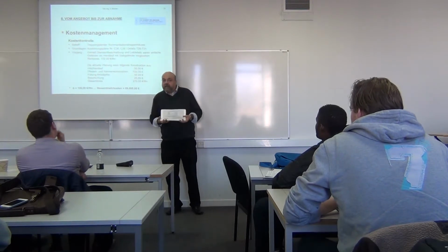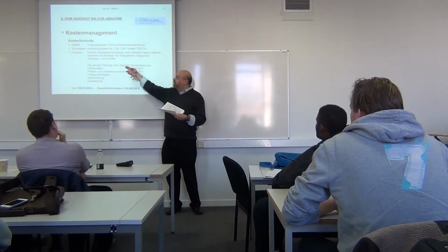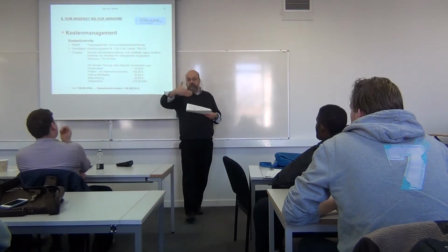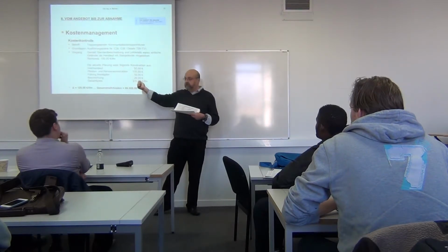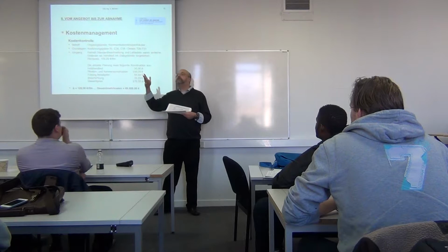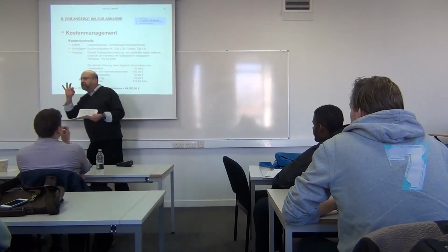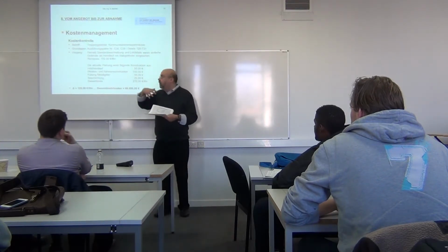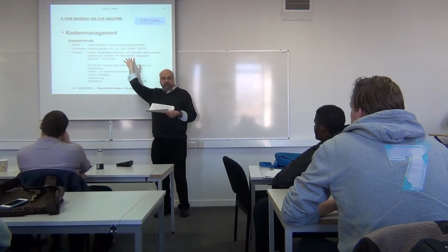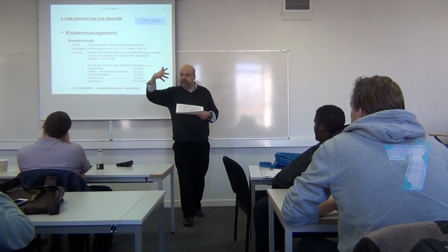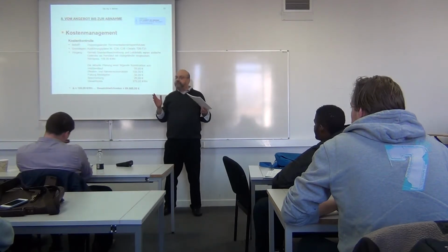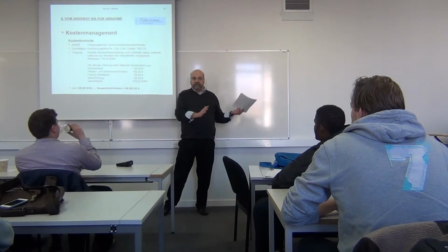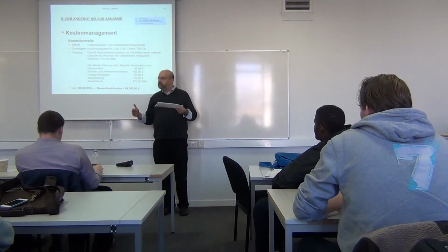Then I can say, okay, dear client, your architect has given this, and the contract is this. Do you want this, but it means 70,000 euros more? Do you want it or don't you want it? And then it depends in which phase this happens. Maybe I already ordered, or my subcontractor already ordered the parts of this first standard implementation. Maybe it's too late. Or maybe it could change, but it costs more to give the old things back and to order the new things, or anything like that.